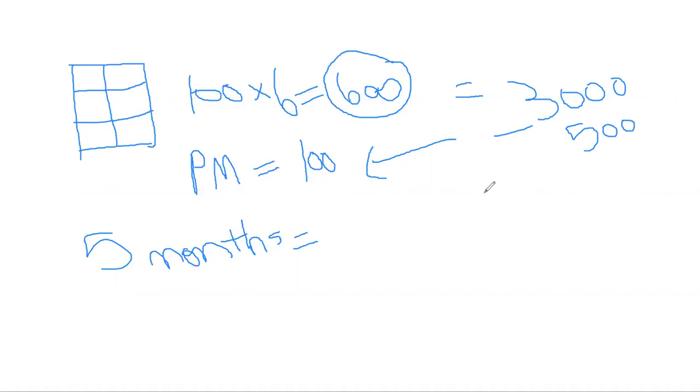So I actually lost $2,500. That's how much I would have made in actual profit had I gotten my building on time, on schedule. Does that make sense? Yes. Okay. So I could sue the contractor and recover a maximum of $2,500. That's a fair number. If I got the $3,000, it's actually a windfall. Okay. So that is that.